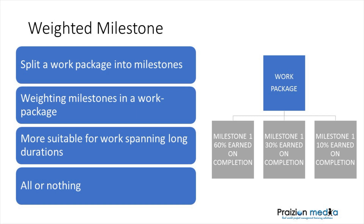The weighted milestone method is more suitable for long duration work packages — according to the PMI, those with longer than two time periods that have intermediate and tangible results or milestones. To be used effectively, the weighted milestone technique requires at least one interim milestone for each reporting period, and it doesn't permit partial credit for incomplete milestones — it's all or nothing. The PMI shows an example of this in Figure 7-3 of the practice guide for earned value.